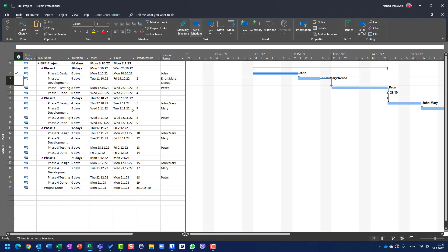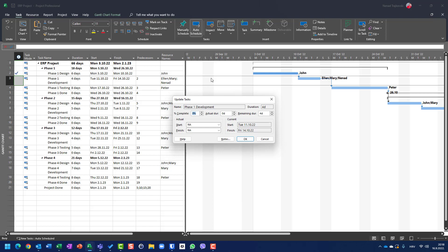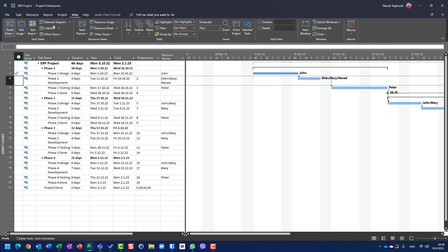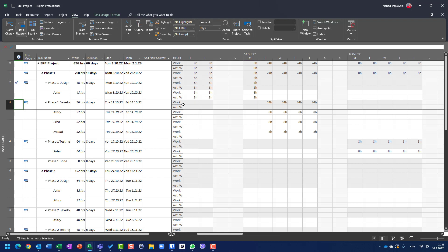Now nothing is done. But what if I know that Ellen finished 50% of her work, Nenad didn't do anything, and Mary is done with her work but was late and spent more hours? How can we handle that? Obviously not with Mark on Track, because there I cannot choose any specific resource. For that purpose, we should go to View > Task Usage.